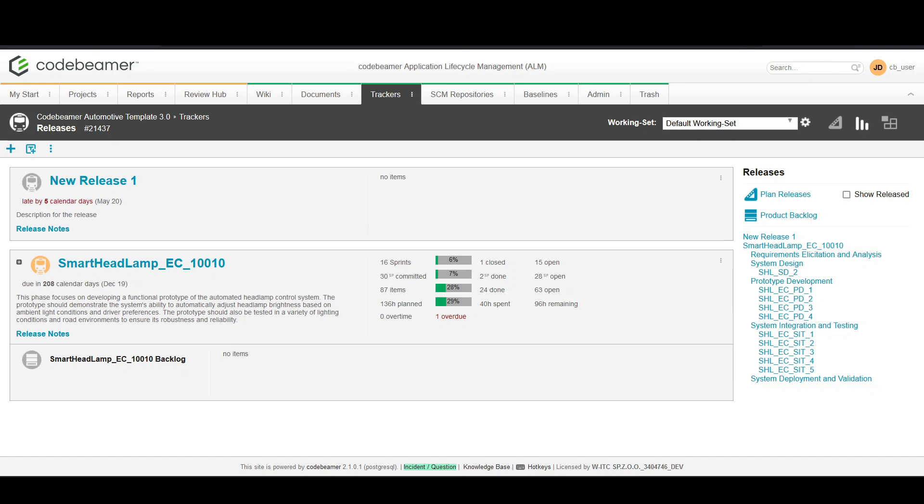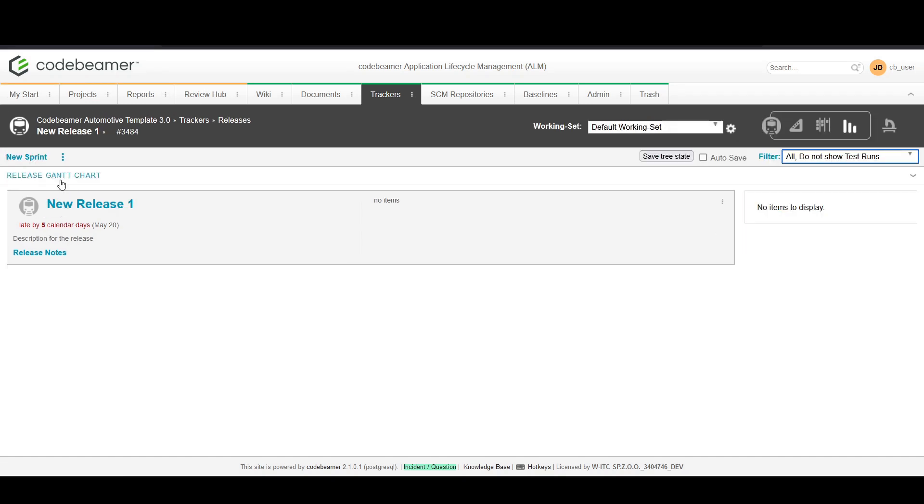First, navigate into the release tracker in your project. This is where you manage both releases and sprints. Select the release you want to add sprints to. If you haven't created a release yet, refer to our previous video on creating releases.